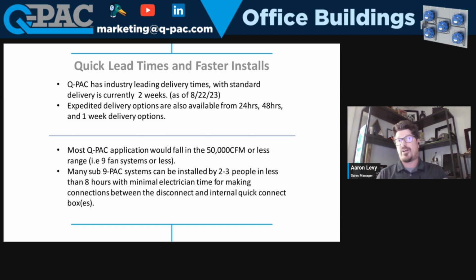Really, we're kind of limited by space and static pressure. That tends to be about the only things that really hinder how many fans we can fit into a space. But it normally takes a less than a 9-pack system, 2 or 3 people, less than 8 hours to install.